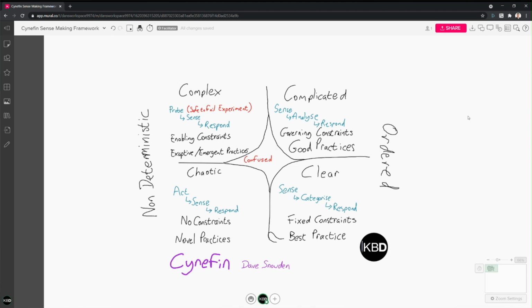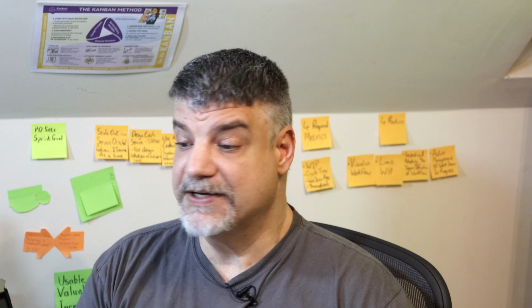If you look at Scrum, a sprint, a good way of describing it is an experiment. It's a time box in which we run an experiment to try and get a sprint goal done. And we have an increment at the end, which is done, which is based on that experiment. And it'll either pass, fail, get results, lead to learning. We might have found a new way not to do it. We might have found a thing that means we don't want to do any of this stuff, it's the wrong market. Or we might find something that's actually a step in the right direction and we get some value from it as well. So there's all those things. A sprint is just an experiment.